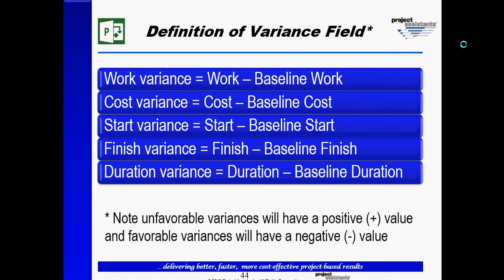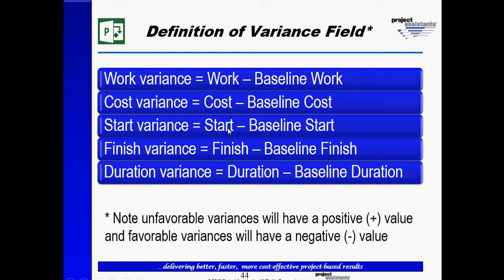As you may recall, we talked about the definition of variance as being the difference between the current estimates, or in this case the start and finish dates, versus the original estimates, or the baseline start and finish dates. Whenever the current estimated start date is different from the baseline start date, a start variance will be automatically calculated by Microsoft Project. The same is true for the finish dates.